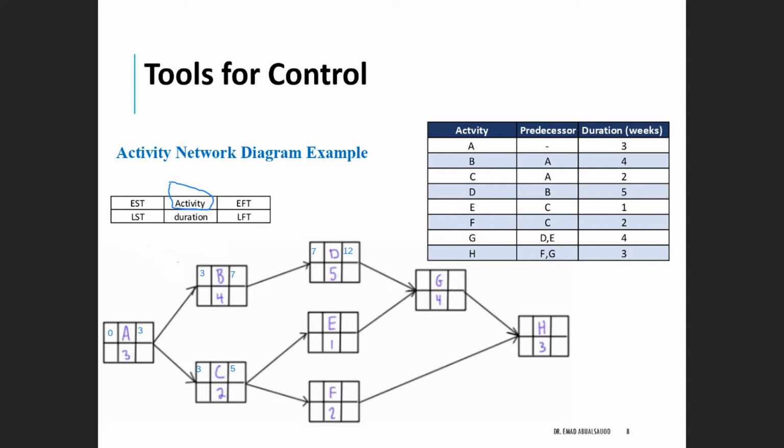Now, before we move on to G, G has 2 predecessors, or prerequisite activities previous to activity G. So we cannot start activity G until we finish E. So let's go down here and finish this branch until we come to that point.